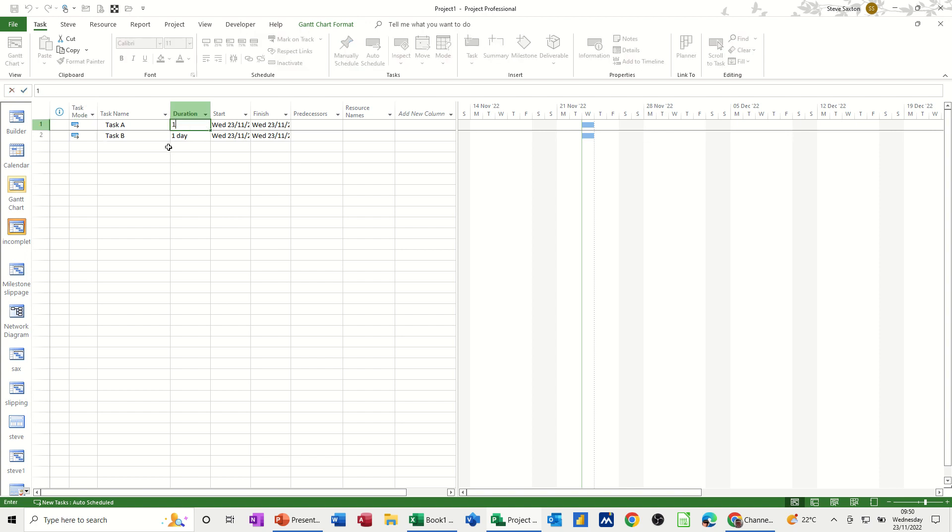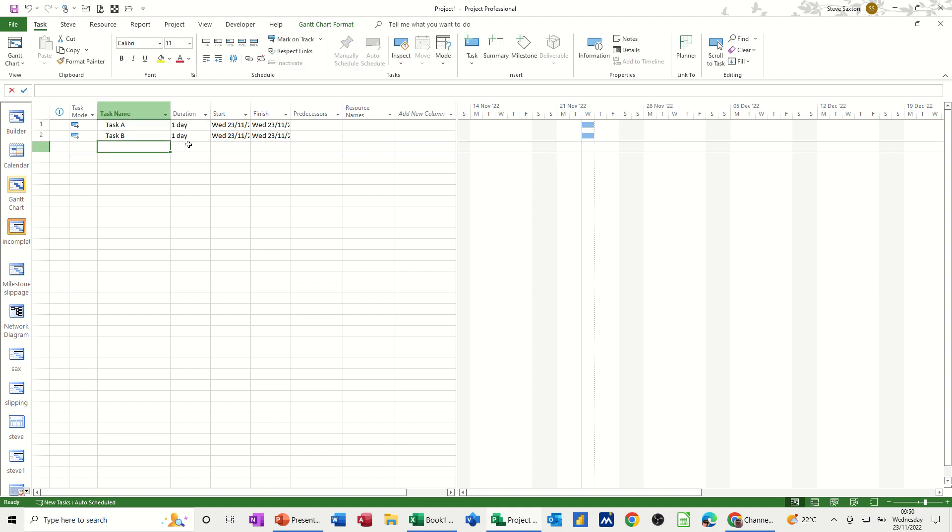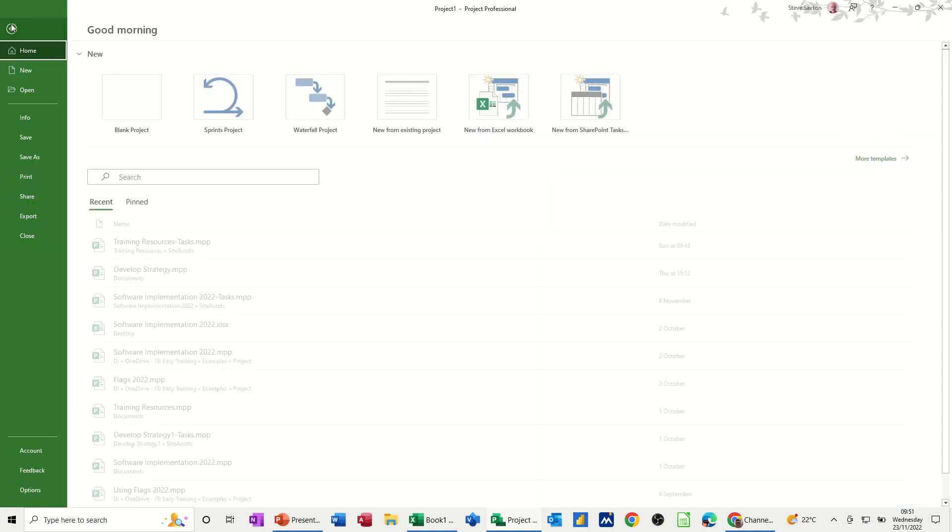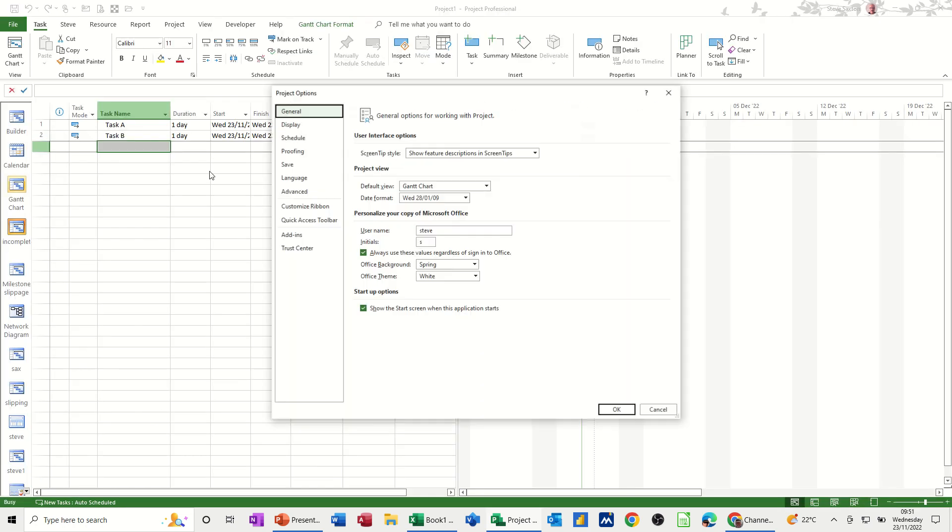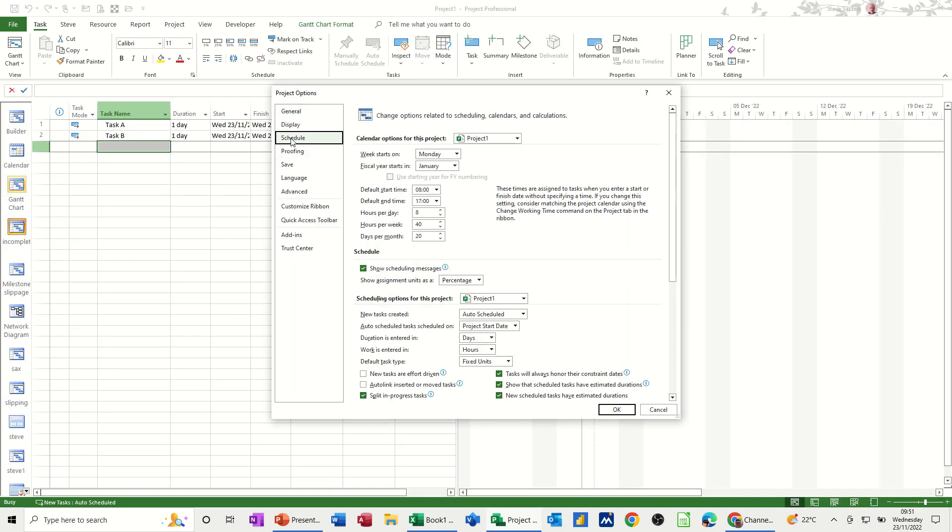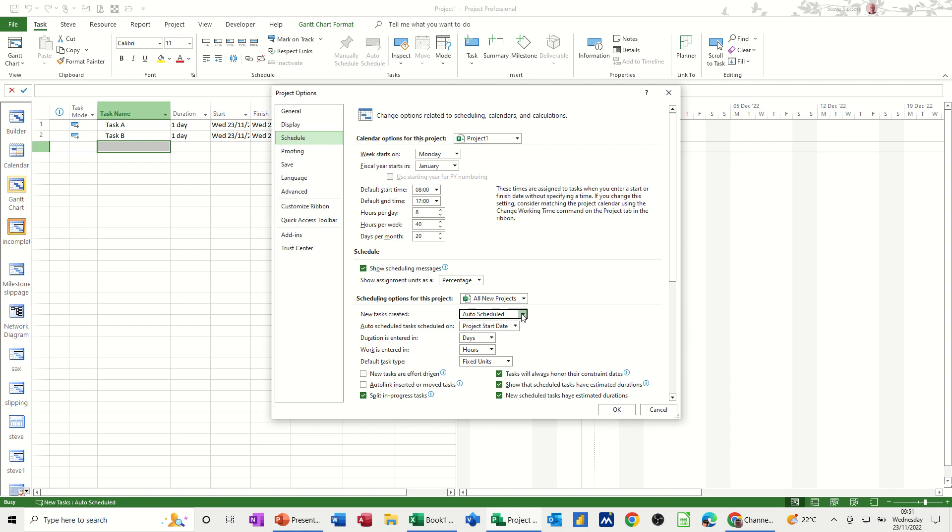It's a lot more than that now, obviously, but that's what it was initially designed for. So to set that up so it's on automatic all the time, you need to go into file and options and schedule. And down here, you need to change that to all new projects need to be set on auto-scheduled.